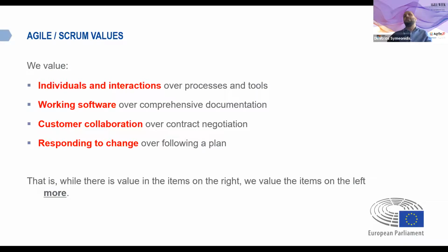And the way that this happened was that, very simply, the business came, they said, we want to do this. We tried to describe briefly in 10 pages or less, okay, so this is what you want to achieve. These are the 10 or 15 changes to the tool that we will need to make. That will be phase one, that will be phase two. Does this sound okay? Yes, we don't aim for a formal validation with signatures or anything like that, because of course, all of this is new.